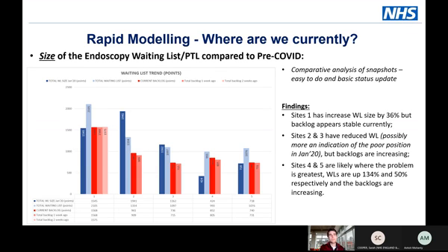And that's what we've tried to do in the red or pink bars that are shown there. You can see if the backlog is stable or is growing. Now, if it's stable, that implies that there should be enough capacity to handle the demand coming through the door. Very crude way of doing it. It's not always a guarantee, but it's sort of adding clues to your story.